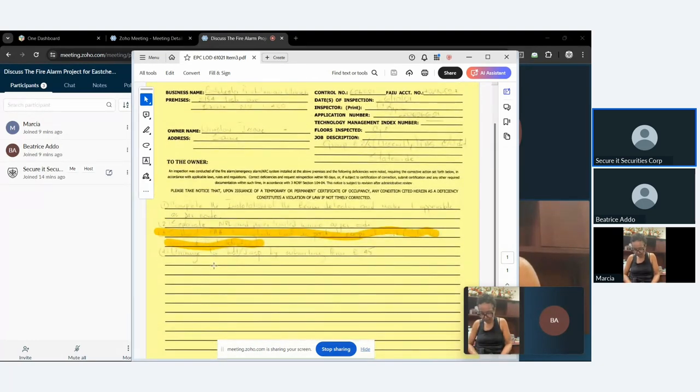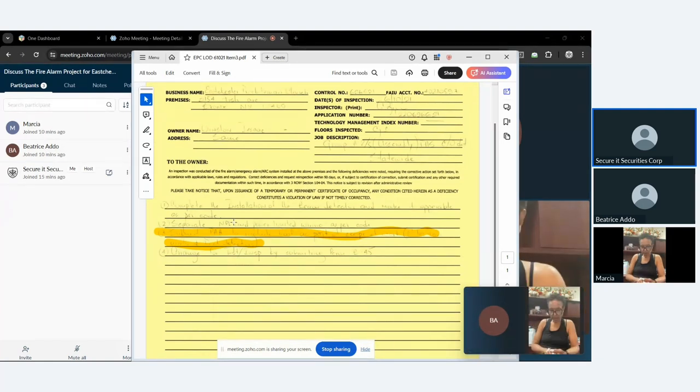The second issue is by the main panel in the front — there's some wiring we need to adjust. That hasn't been done yet. The man couldn't perform the test because I didn't have the smoke to actually test it at the time for him to see it go off. He wrote it up as not working, but now I have the smoke to put into the sanctuary so he can see the beam detector go off. That was a curveball at the time.